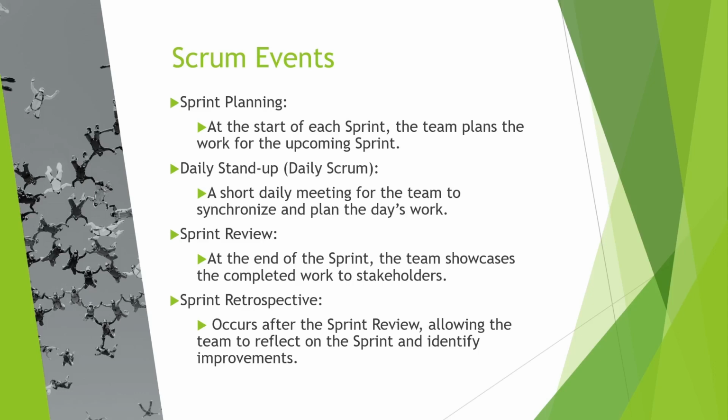In an active sprint, you will have a daily stand-up call saying, okay, what was accomplished, what's in the pipeline for today or tomorrow, and any issues that you have. We don't want a scenario where a developer is struggling, and they are new to the team and don't want to open up and talk about things. If there is a problem they are facing, we want them to bring it to the team so the team can address it. And if it is a big problem, we want to know upfront, and we can say, okay, this feature is going to take more time, or whether it is technically doable or not.